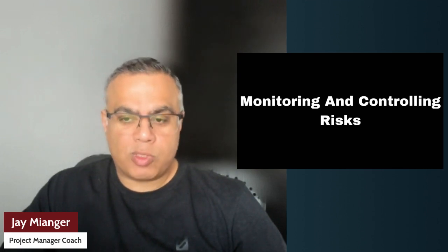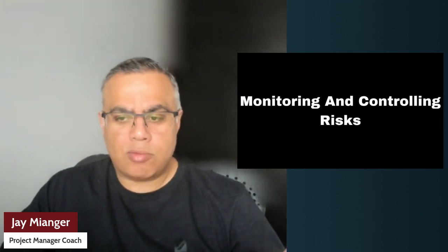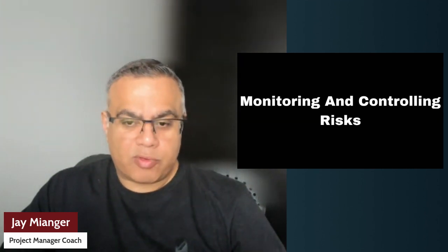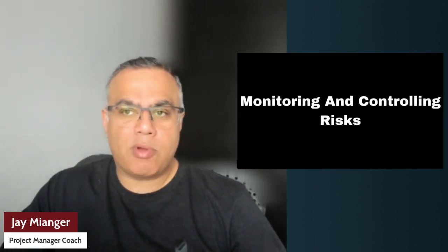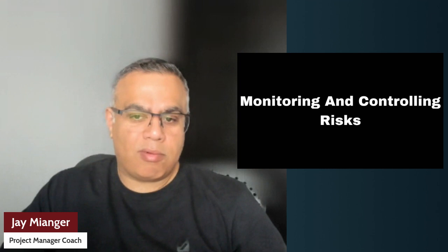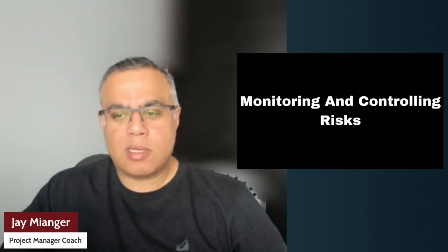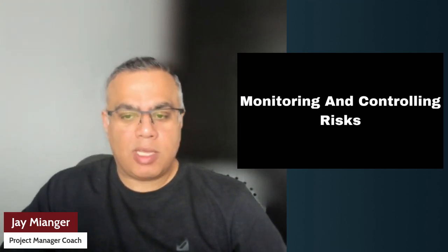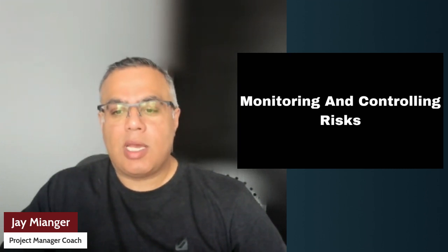You put all your responses in. Your RAID log will have such things as the risk number, which you can tally against your project plan. It will have a brief description, a detailed description, and a RAG status. RAG is red, amber, green. Red obviously needs to be really focused on. Amber is probably a medium threat. Green is something we can accept. That helps you visually understand the importance without having to read so much, and focus on the red items, for example.